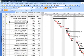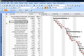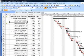If you see here carefully, for each activity now I am able to see two bars: a black one and a red or blue depending upon the criticality. The black bar is always the baseline bar, that means my planned schedule. The red or blue bar will show me the actuals.